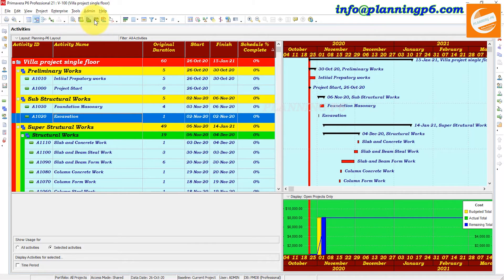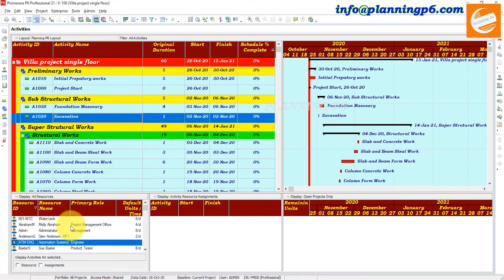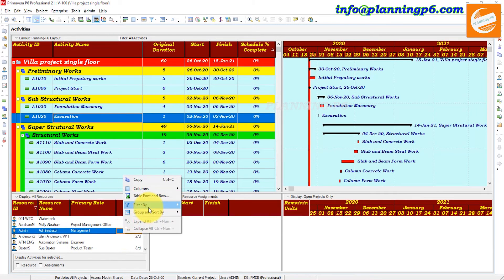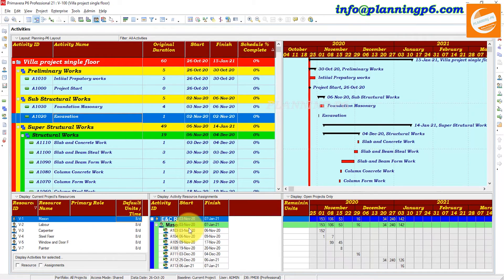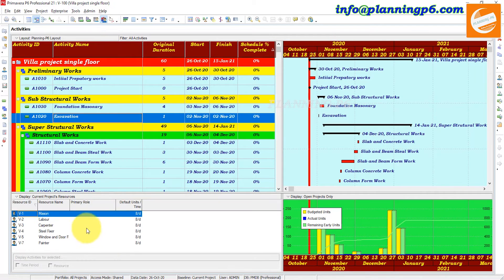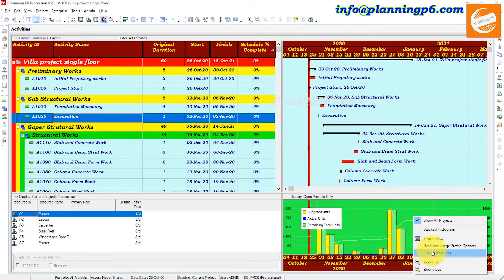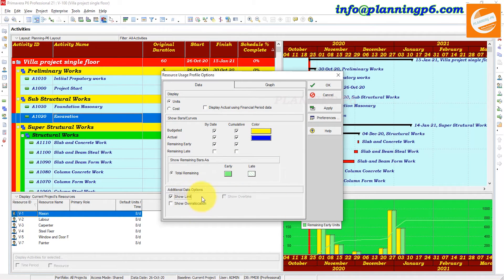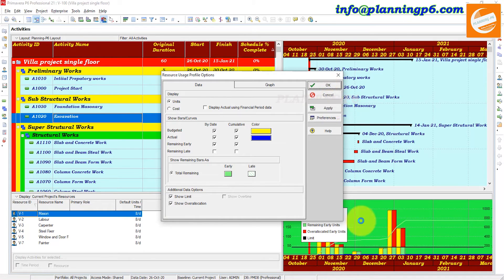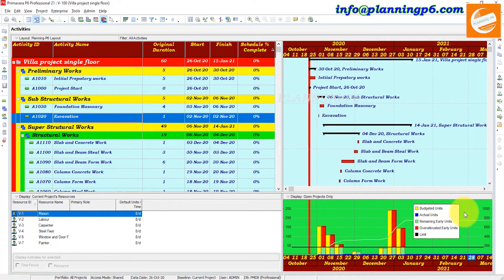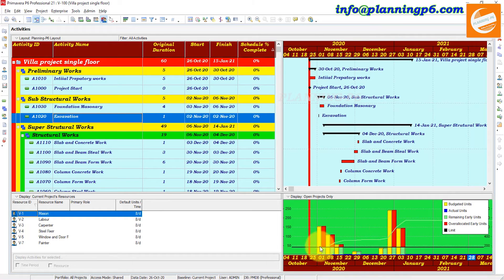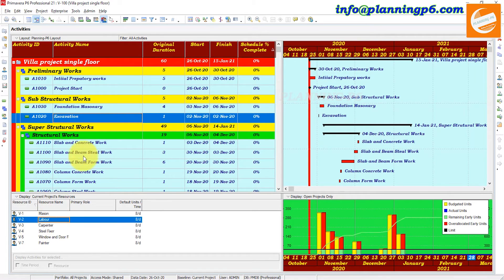We will open the over-allocation view. Go to Filter by Current Project Resources. Check the options: Show Limit, Show Over-Allocation — click Apply. Now you can see the over-allocation for specific resources is showing.